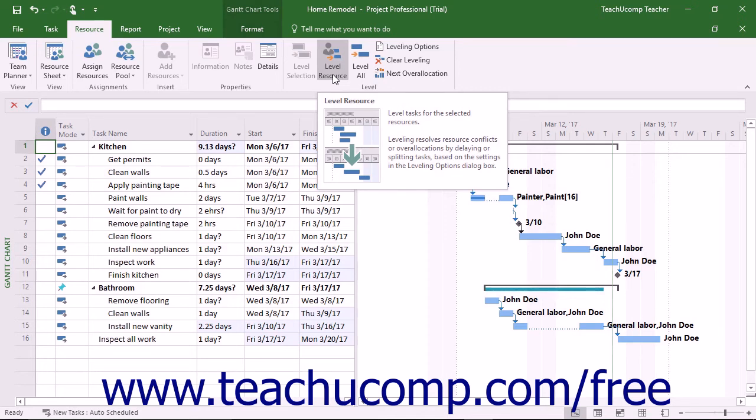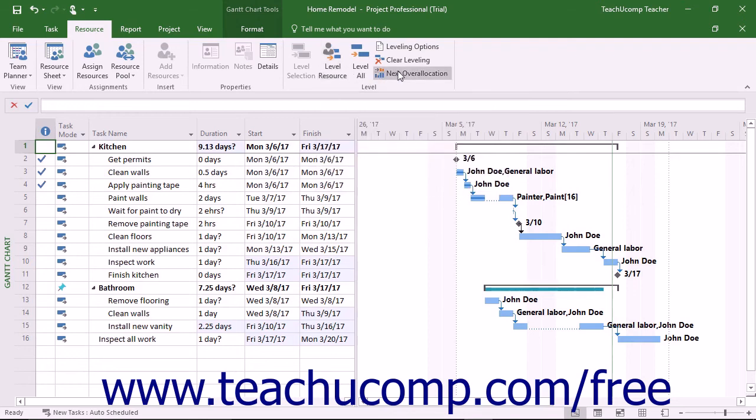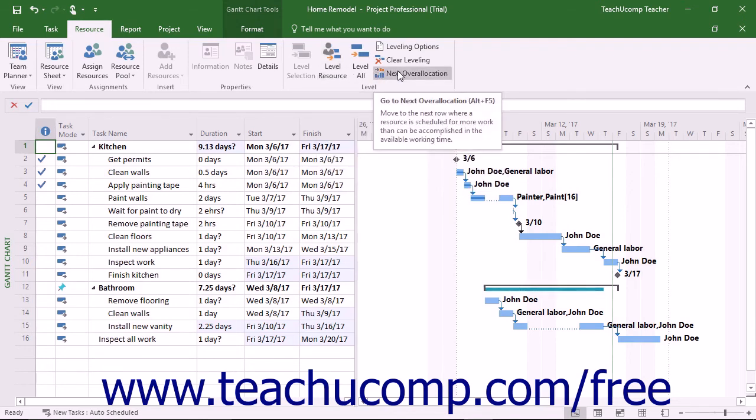To select the next resource overallocation to resolve if you decide to manually level each resource or task individually in a project file, click the Next Overallocation button in the Level button group on the Resource tab in the ribbon.